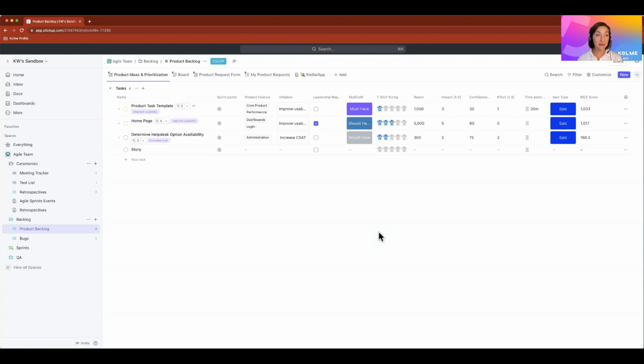If you see on my screen in ClickUp, I have everything here. I've got sprint points, t-shirt sizing, and time estimates. No team would likely use all three of those estimation methods, but it's available and I could use all three. And then from a transparency aspect, marketing can understand how long developers will take if there's a time estimate. Scrum Masters will understand how long something will take for planning if we're using sprint points. So we can speak the languages of the other teams, which is another advantage of working in ClickUp. It's so customizable.